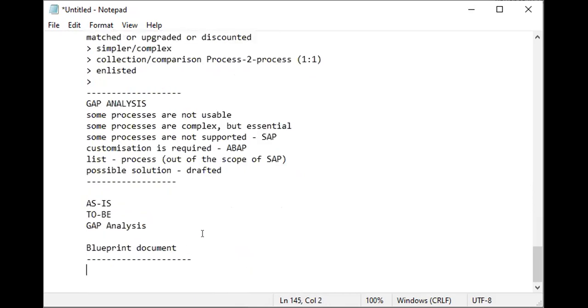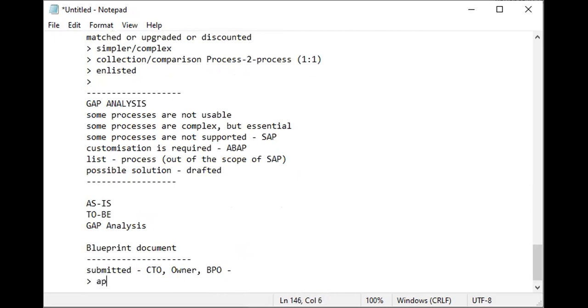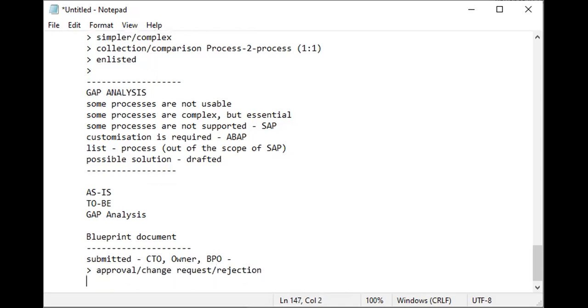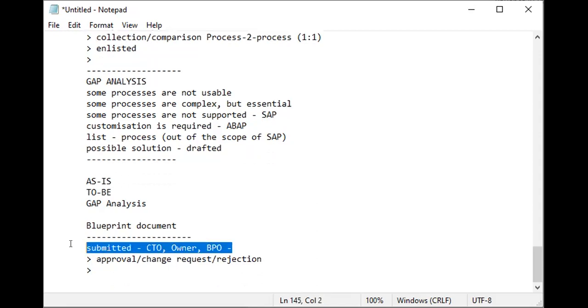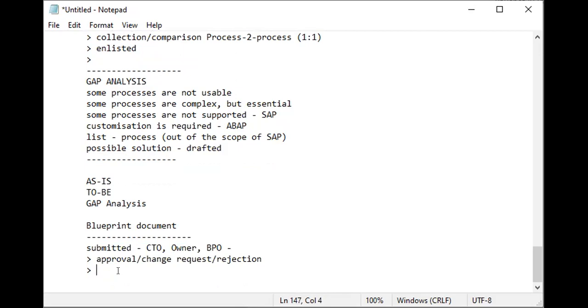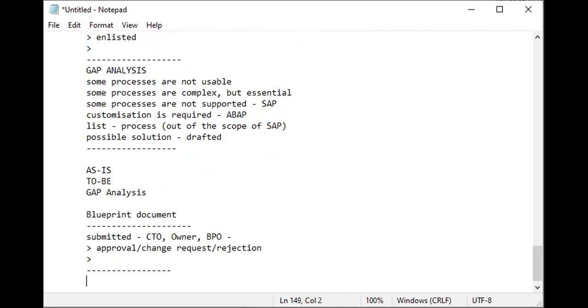The blueprint document is made and submitted with the client, with the CTO, owner, and VPO. They actually sit down and review it word by word, and approval, change request, or rejection is the responsibility of the client and management.